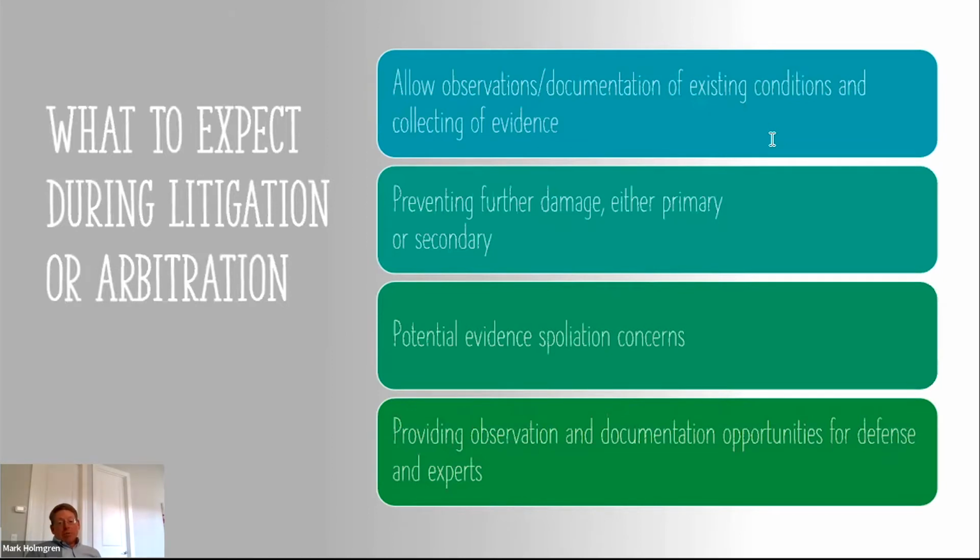Arbitration works like a trial. You have a judge who's called an arbitrator, and you have a hearing and you present witnesses and evidence and testimony, and the arbitrator makes a binding decision and you're stuck with it. Arbitration is different from litigation in that, in theory, it's supposed to be quicker and more efficient and less expensive. However, it doesn't always work out that way.